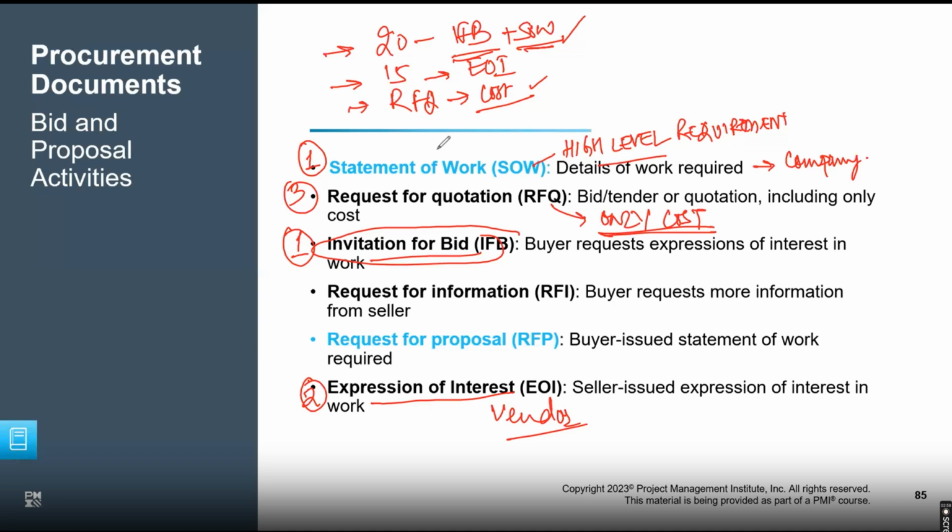Now when the 15 people respond, some prices will be out of my budget. The moment I get the RFQ, I see these are too far out. So hypothetically, out of 15, 5 are exorbitantly high and out of budget. No point in discussing. So the company does the filtration there, and we have 10 vendors who make logical sense. Those 10 vendors will receive the RFI. This is my point number 4, request for information.